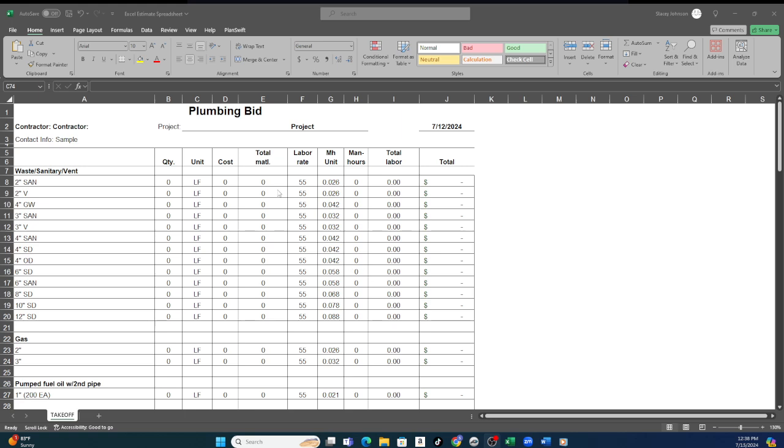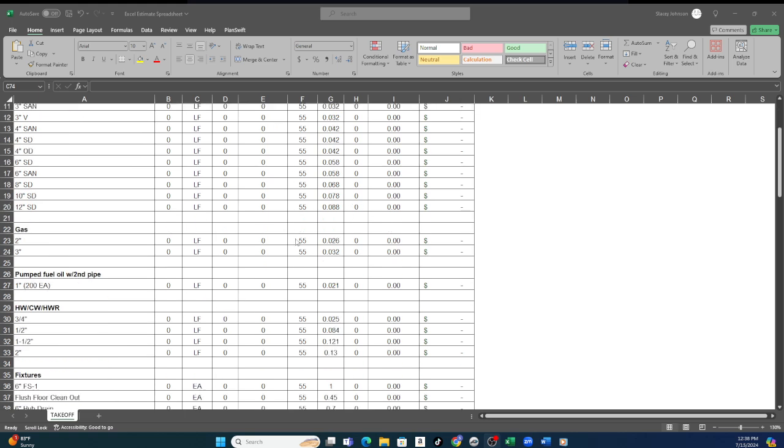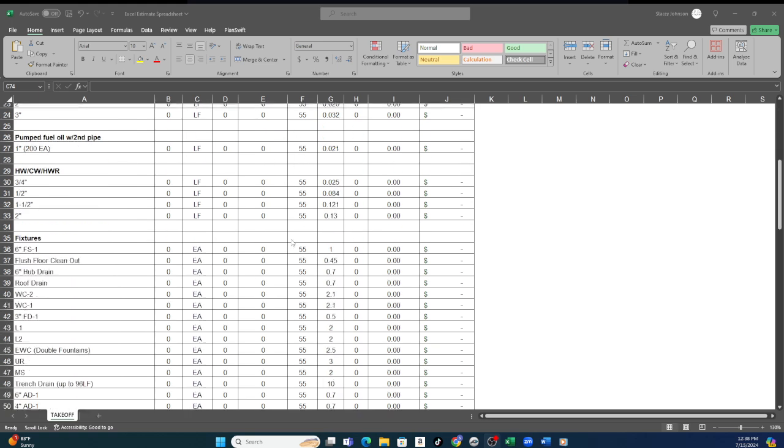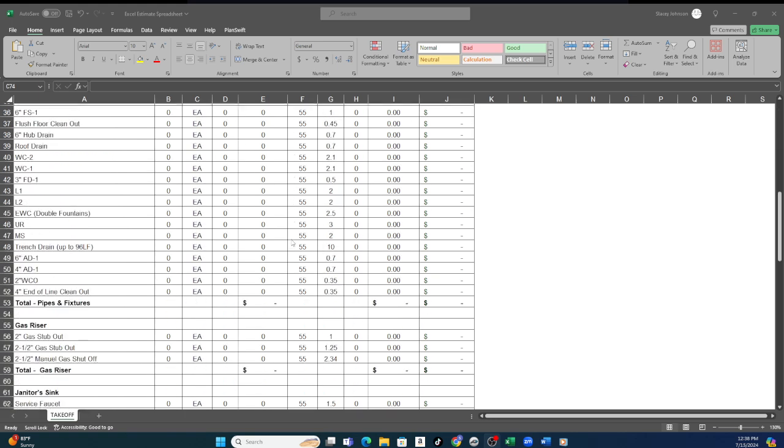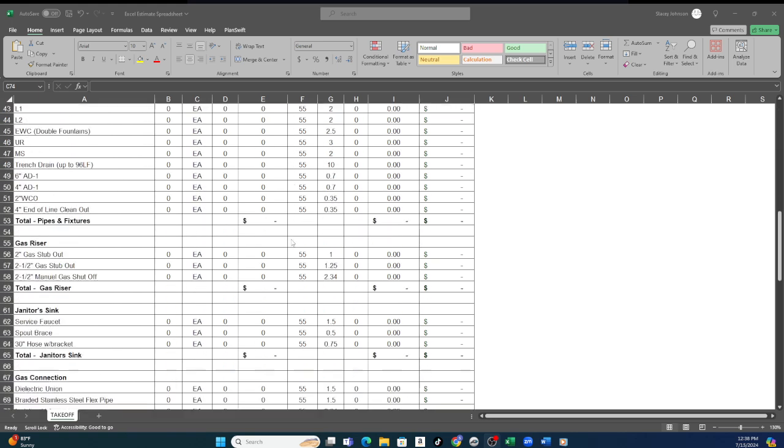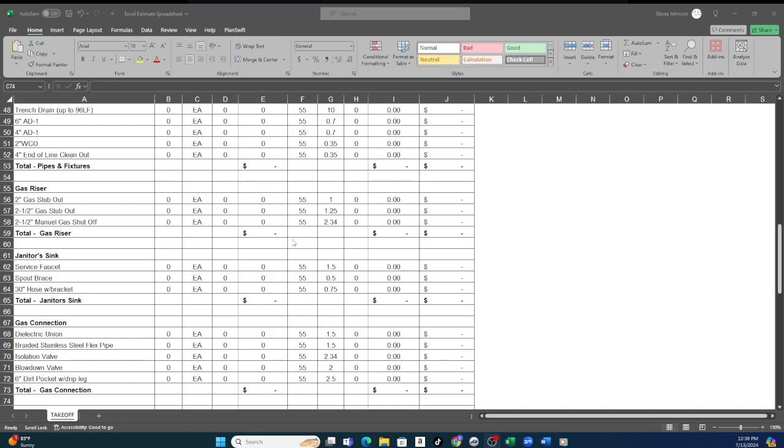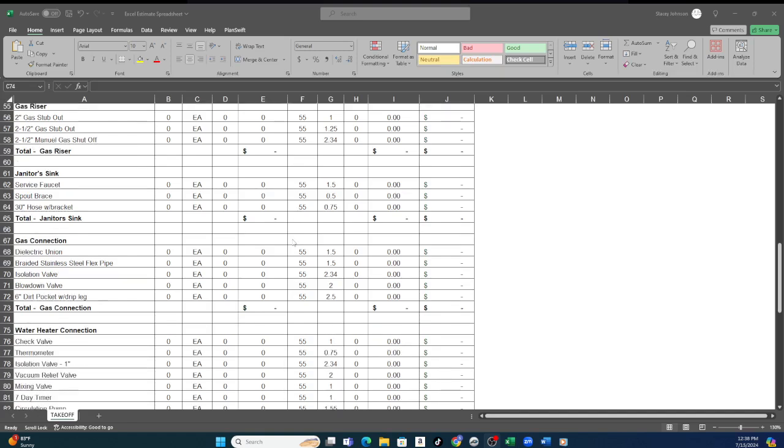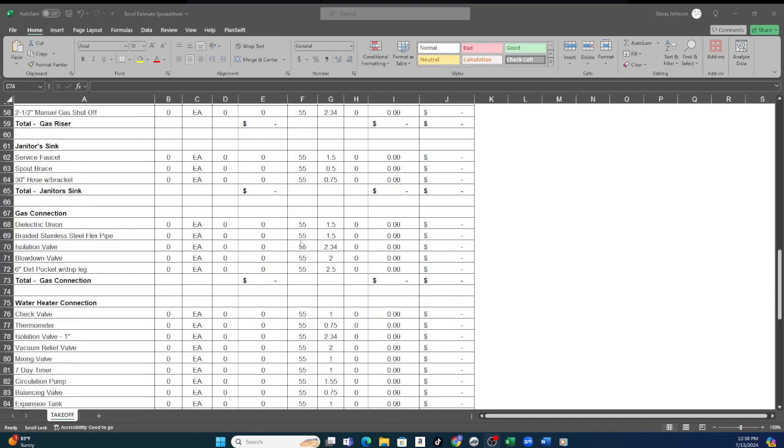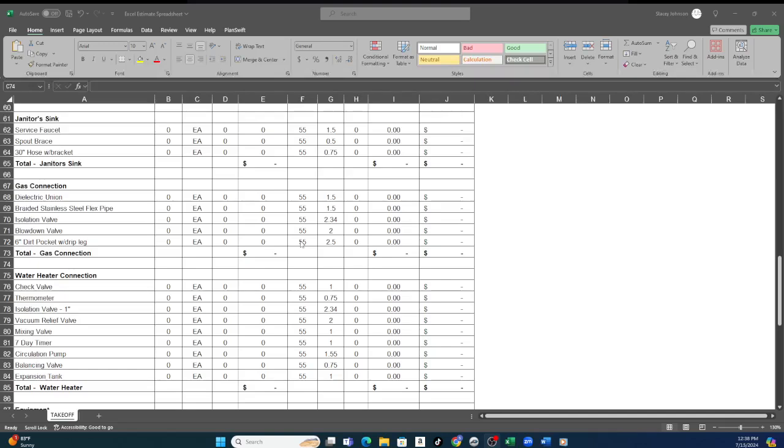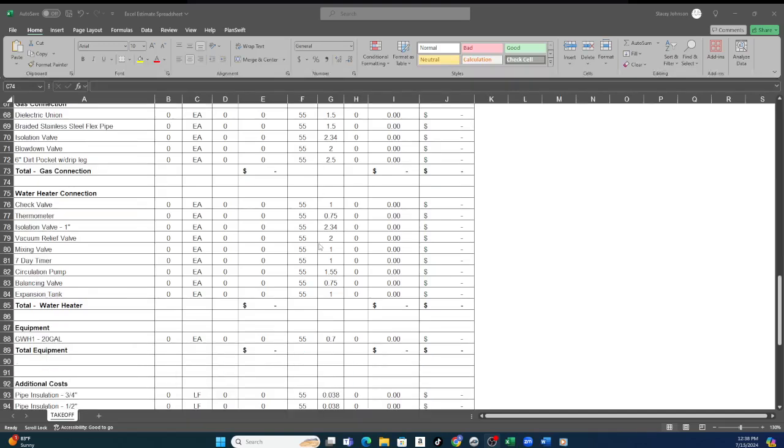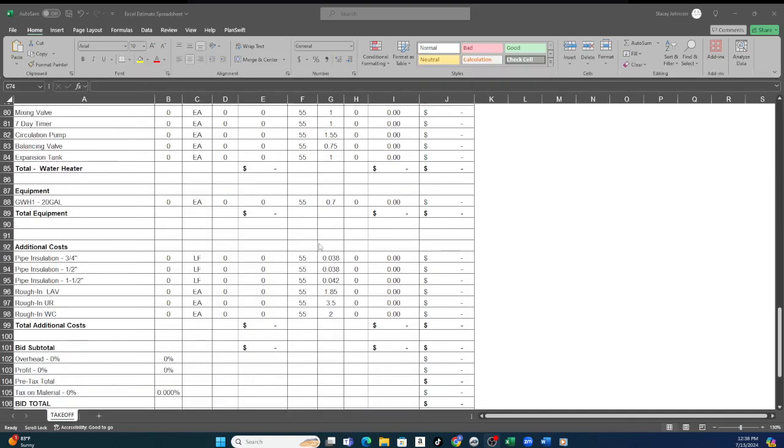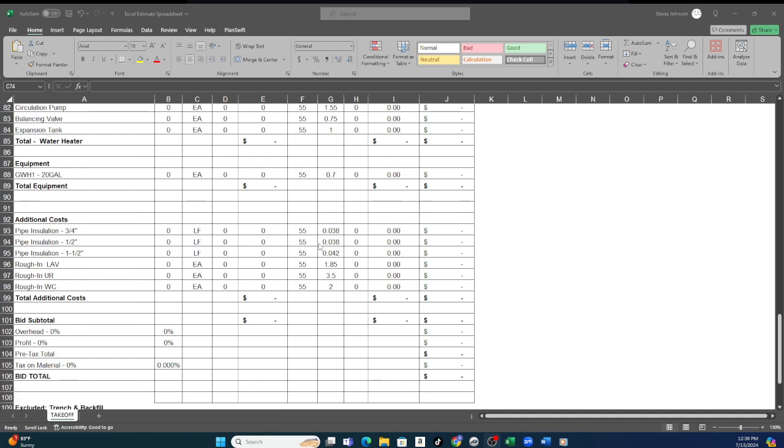So the first portion will have all your piping, then all of your fixtures in very good detail, and then all of the connections that apply to each of the fixture types. Then any additional, which for plumbing is usually testing the system, the permits, and also the cost for insulation of the piping.